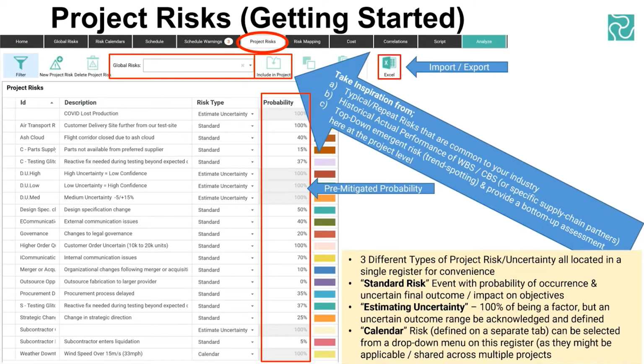However, we've made some advancements and evolved it a bit. You can very easily create a new, say, calendar risk based on actuals. So if you have real life telemetry data from a weather station for, say, 1 year, I'll show you how you can do that, make it last for 10 years for an upcoming project. An evidence-based approach is always good.